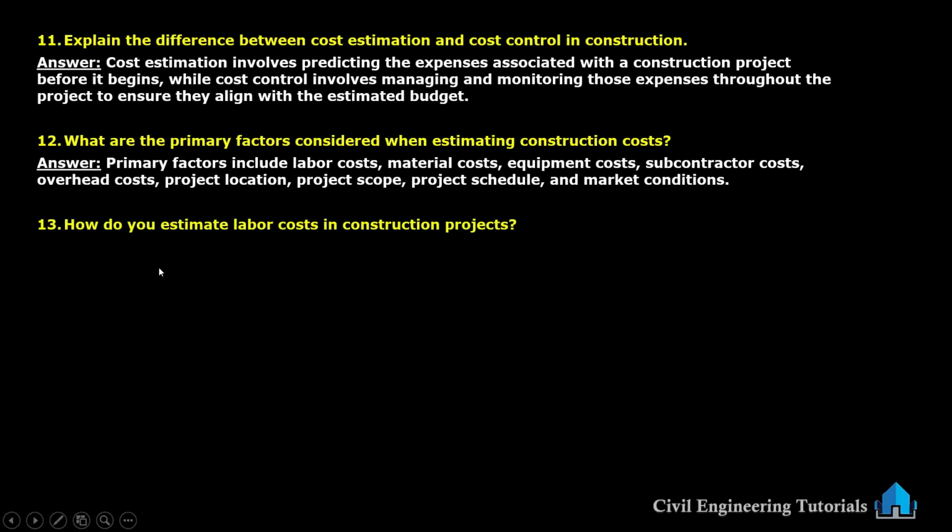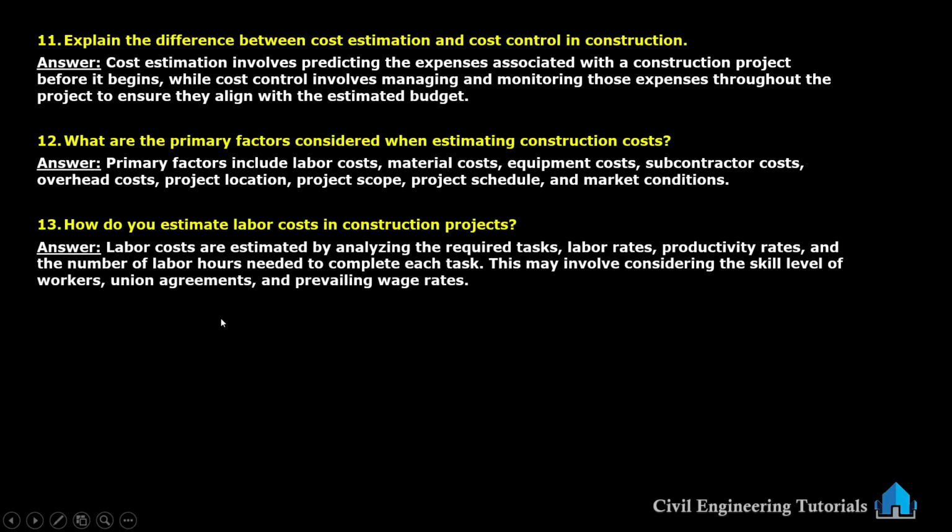How do you estimate labor costs in construction projects? Labor costs are estimated by analyzing the required tasks, labor rates, productivity rates, and the number of labor hours needed to complete each task. This may involve considering the skill level of workers, union agreements, and prevailing wage rates.